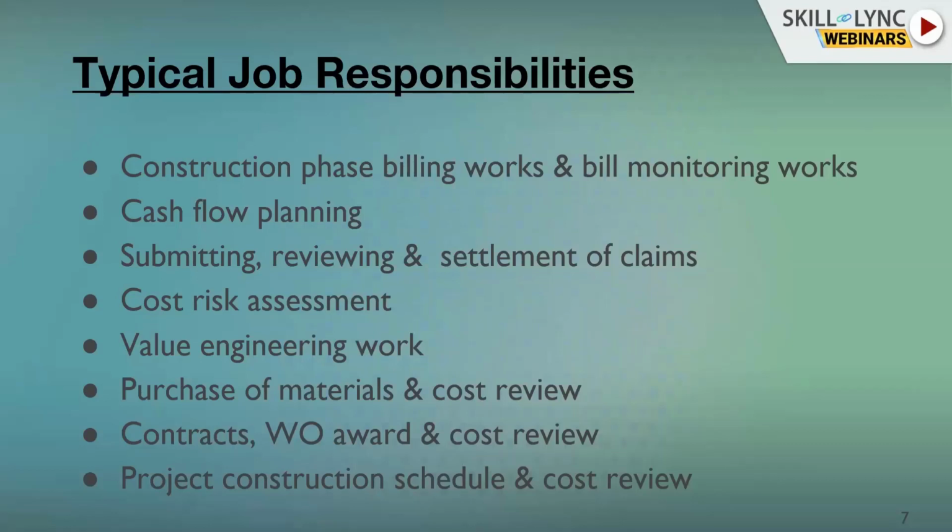Next is project construction schedule and cost review. So the scheduler will be there, he will prepare the schedule, and then he will monitor the schedule. But as a cost controller, we need to have an eye on this project construction schedule, because as the schedule extends, if there is any delay, then overheads will increase for all staff costs, electricity, all associated overheads. Then that cost will be added on to the budgeted cost. So we need to have project construction cost review.